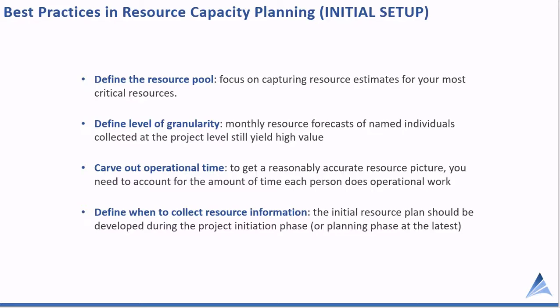The goal is not perfect data — the goal is good enough data to make better decisions for your portfolio. Also, don't forget to carve out operational time. You want to know how much time people are spending on their day-to-day work. Some individuals focus most of their time on operational work and have a little bit of time for project work. Regardless, you've got to account for operational time. You don't have to account for every line item — all the vacation, sick time, training, meetings, email time, etc. Generalize about how much time they need per week or per month for operational work. Time tracking can be useful here to track how much time they spend on non-project work, and then use that to block out operational time. The remainder will be what's available for project work.